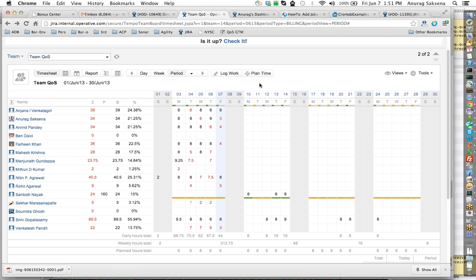Now, the beauty here, and this is not some great magic, is that work that I have logged in that story is actually going to show against my burn down chart in my Agile view. If you remember, in iterations, as managers, facilitators, and Agile coaches, you would want to keep a tab on how your team is burning down effort every day. These 3 hours that I logged here would automatically get contributed towards the Agile burn down chart. So I'm not really filling out a timesheet here, I'm really logging work against my burn down.